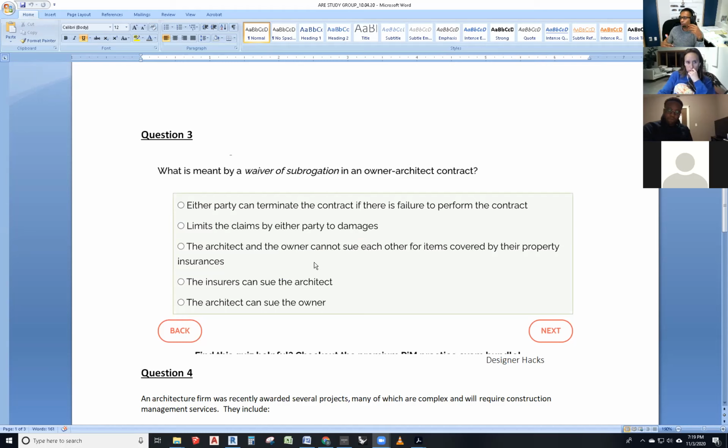But let's say because of that accident, I am late to a $1 million project meeting that was mine, and I lose that $1 million meeting. That's a consequence of damage to that initial situation. That insurance already covers my property damage. Who covers my consequential damages for not making it on time? That's when I'm going to sue you. I'm going to sue you for the consequential damages of that.